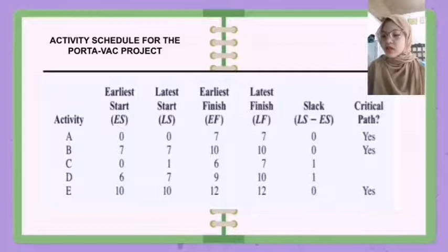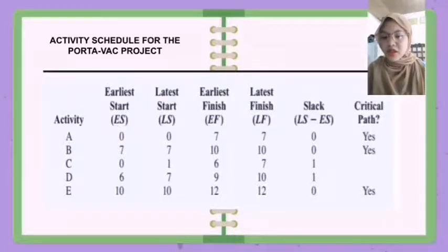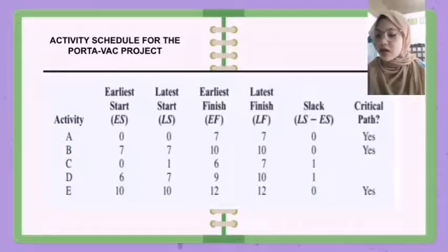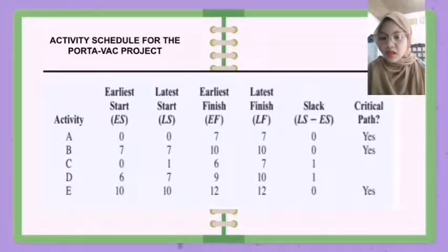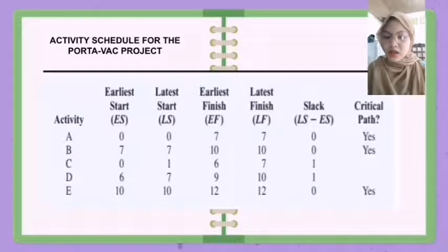Now, suppose that current production levels make completion of the maintenance project within 10 days imperative. By looking at the length of the critical path of the network, 12 days, we realize that meeting the desired project completion time is impossible unless we can shorten selected activity times.